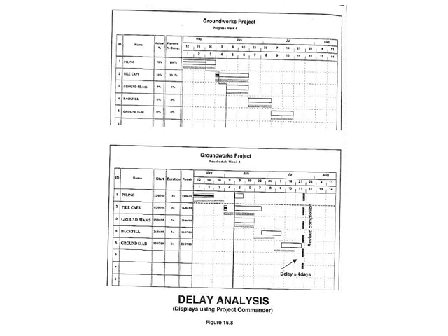Now during the project there was the delay that we spoke of earlier. So you can see this is where the actual progress is. Okay, and this is where it was supposed to be. Okay, so this is at week 4, this was where the project was supposed to be. So now what the program does is they moved the entire program out, and so that item is still not complete. That item still has quite a bit of work to do. This one had the float, the 2 weeks float that they spoke of.